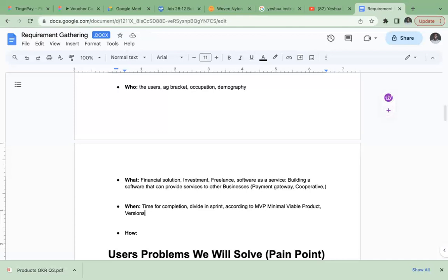The meaning of MVP is the major thing the product is supposed to do. So send and receive money. That's all we'll be doing for this development. And we say it's 3 months. So after 3 months, this product should be able to send money and receive money. We'll test it. Was he able to send money? Is he able to receive money? If he passes, then our MVP is closed.